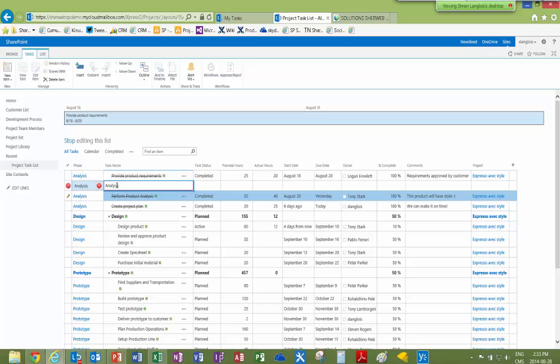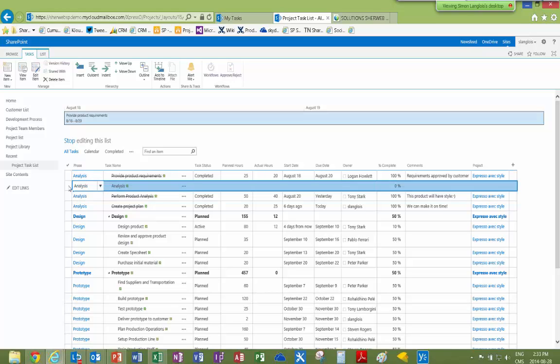There's another feature though that is called predecessor. So you could add a column, which is an automatic SharePoint column, called predecessor, and you could assign a certain task as a predecessor to another one, and in that case, in the Gantt chart too, it would need to be after the second one. Otherwise, SharePoint would notify you that it can't be in parallel, but it's not the same thing as a subtask.